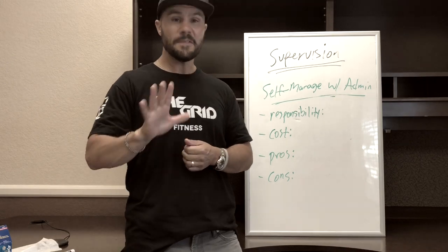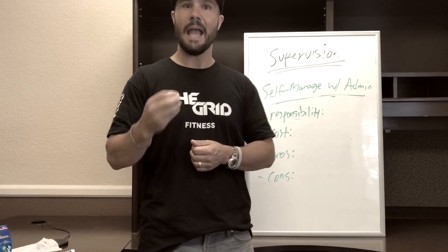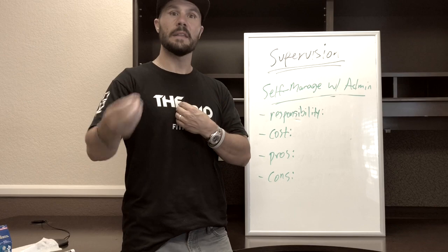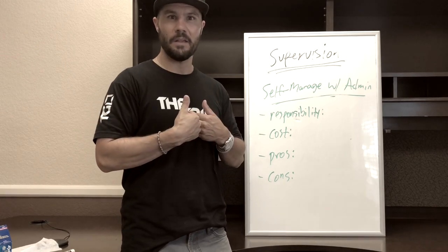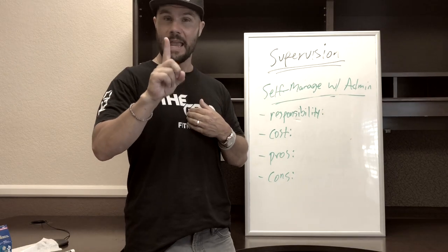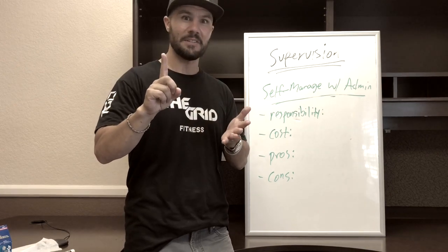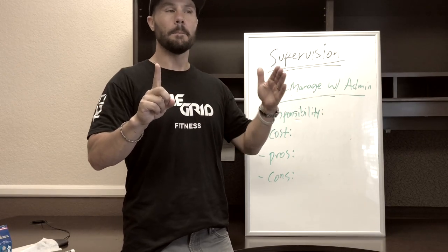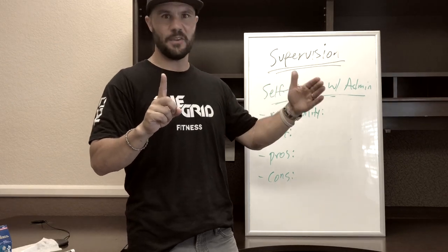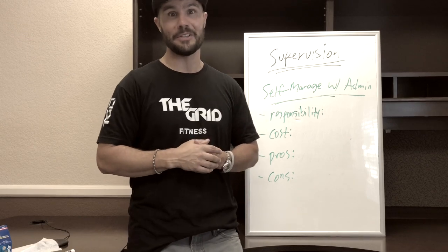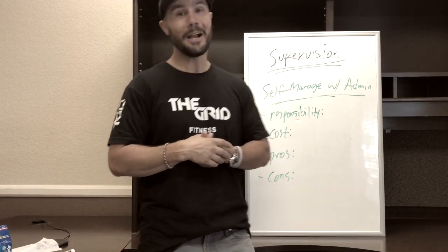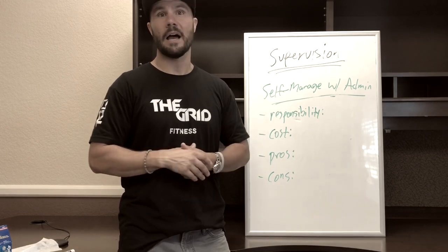It costs me $50,000 to have an admin. I manage it with an admin, but now I can do 3 projects with my bandwidth with one annual fee of $50,000, three high 6-figure projects. I don't need a lot of projects if I'm making high 6 figures on a project, right? I don't need to do a lot.